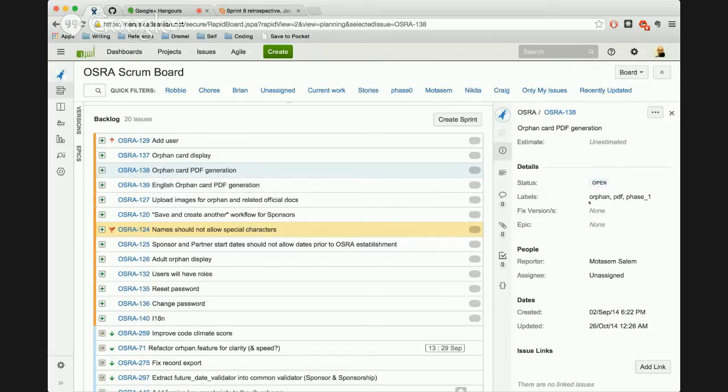But at this point, these are all phase 1 stories, and for the time being, we're not taking any of those on yet because it's very possible that the client will decide that there are different priorities for phase 1. These were created at the very beginning of the project, so they're out of touch with reality, let's say.